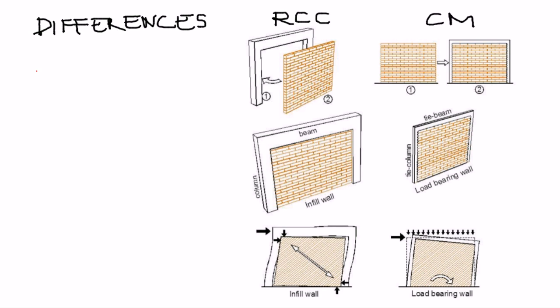First difference is related to construction sequence. In the case of RCC frame construction, RCC frame is constructed first and masonry walls are constructed next. Whereas in confined masonry construction, walls are constructed first, followed by concrete confining elements.